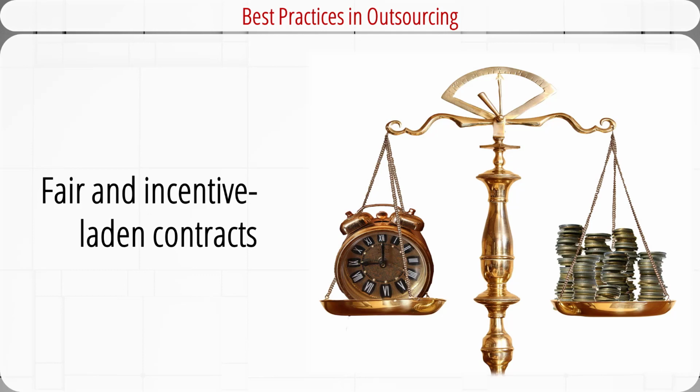Performance-based contracts are becoming increasingly popular. They establish significant incentives and penalties based on priorities of the project. For example, if time is critical, then contractors receive bonuses for beating deadlines and get penalized for missing the deadlines.